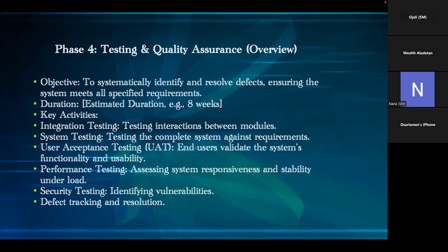Well, there's a test summary report from the testers that you will have, but for your own report to the stakeholders, you don't need to detail all the different tests that they've done. All you need to do is to summarize what has been done. You can say tests carried out 4, bugs detected 3, bugs resolved 3. That's all.